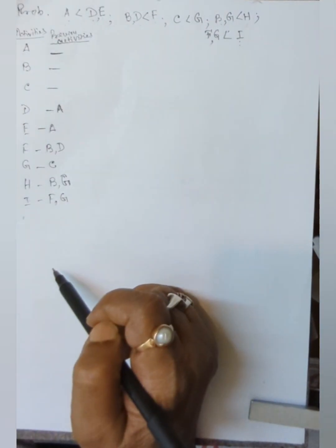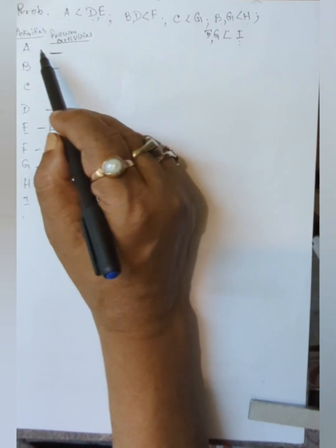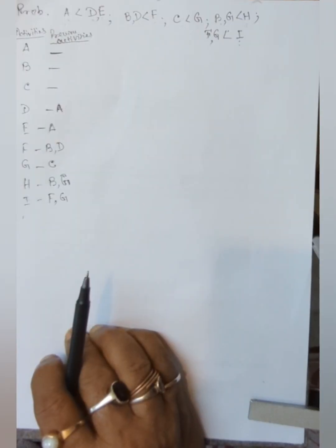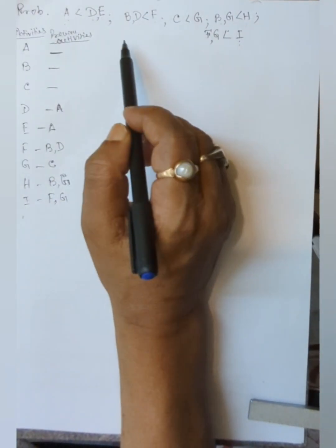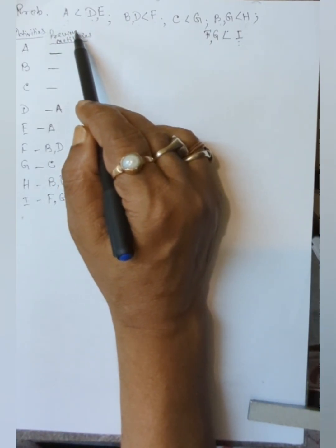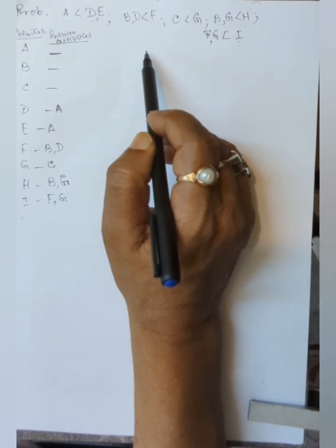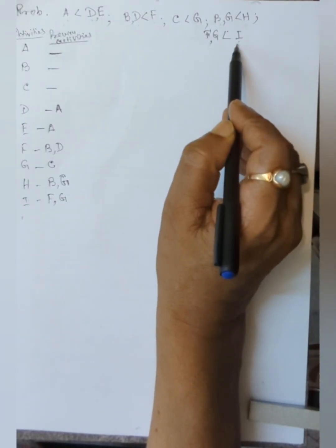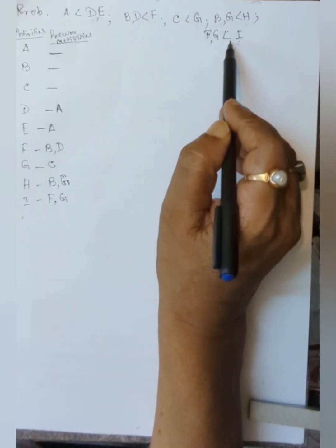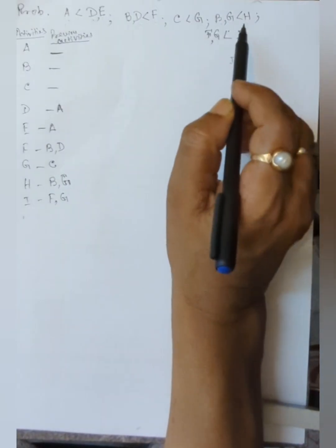That's why this is the predecessor relationship, or the previous activities before starting these activities A, B, C, D. So what you will do, I will draw. One thing again, you can check: if an activity is not a predecessor of any other activity, that is, you do not have to complete it before starting another, then you can say it is a terminal activity. Which are the terminal activities? You can check. Say I. I is not a previous activity for anything. That means I is a terminal activity.